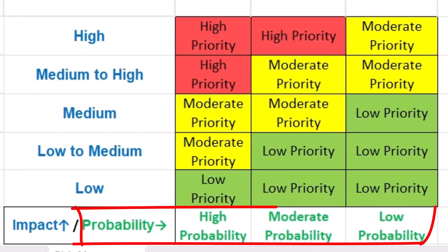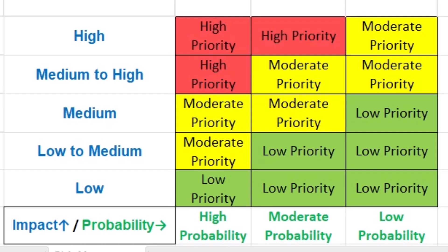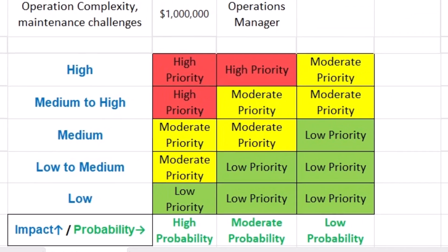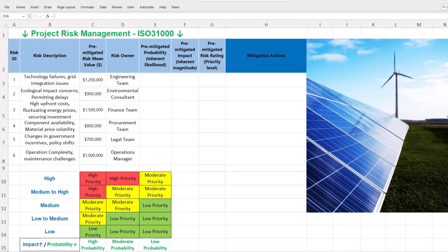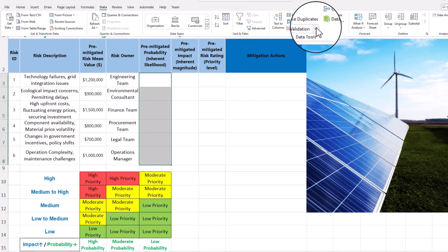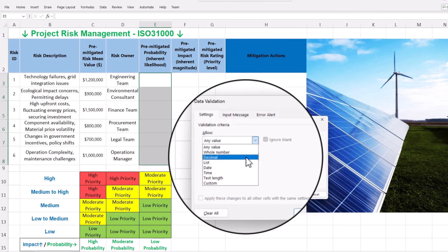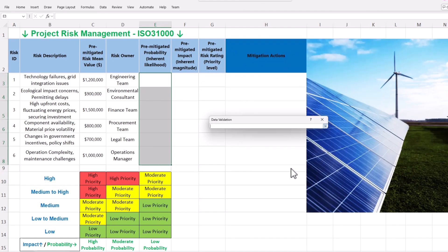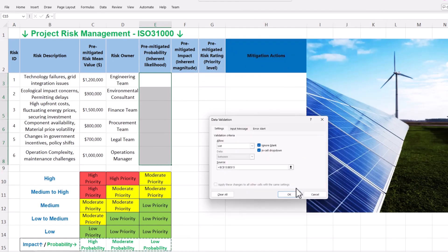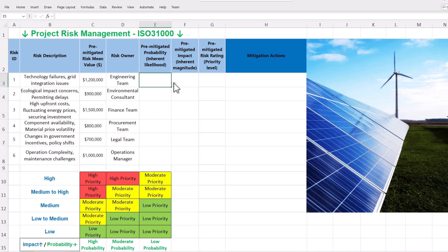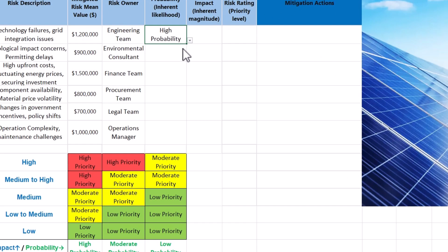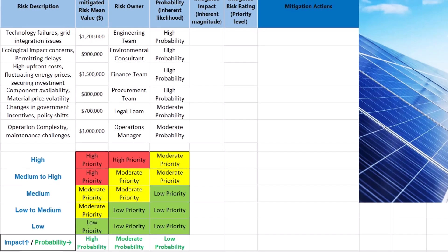There are three values assigned to likelihood or probability. To minimize human errors in data entry, we can use the data validation tool in Excel and create a drop-down menu. Select the relevant cells and navigate to the Data tab and choose Data Validation. Then under validation criteria, select List. Finally, specify the data source by selecting our defined likelihood values on the project risk matrix. Each cell now has a drop-down menu from which likelihood levels based on our risk matrix can be selected.